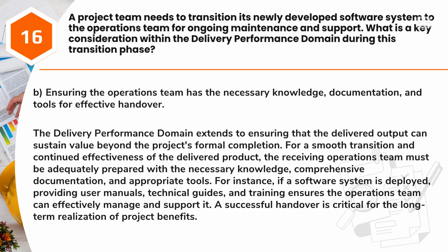Answer: B. Ensuring the operations team has the necessary knowledge, documentation, and tools for effective handover. The delivery performance domain extends to ensuring that the delivered output can sustain value beyond the project's formal completion. For a smooth transition and continued effectiveness of the delivered product, the receiving operations team must be adequately prepared with the necessary knowledge, comprehensive documentation, and appropriate tools.